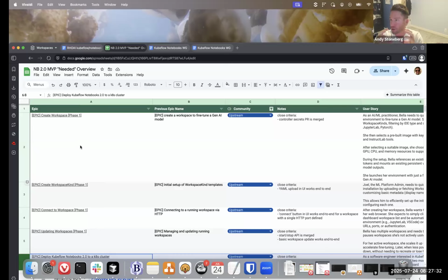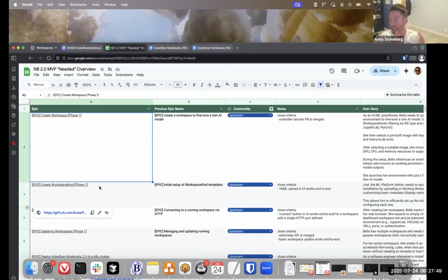I think while we march towards an initial GA, if we have much more specific targeted epics, it becomes easier to understand what you should look at. Because if Epic 1 isn't closed, any PRs related to that are top priority, and then we want to close that and move on. So smaller epics, until we get to an initial release, help us coordinate the work. Then when we have a more stable foundation and an initial complete vision, if we want to go to long-running epics, that's fine. I just feel like it causes more planning and confusion right now on what's most prioritized, as we have multiple expansive epics, and it's not as clear.